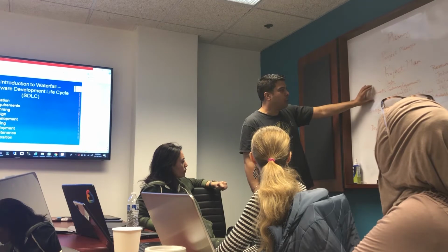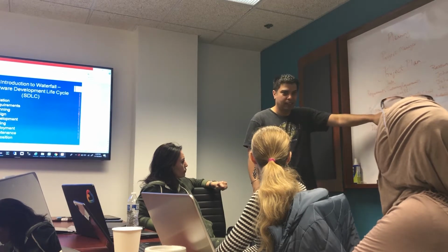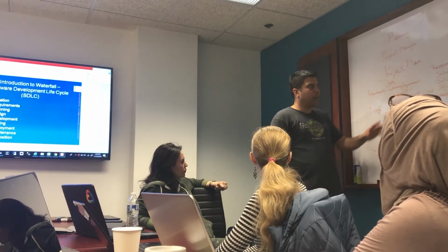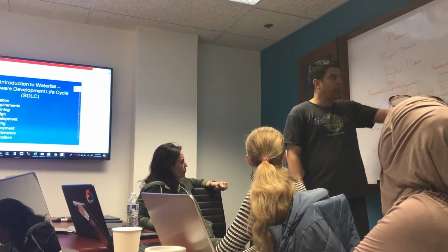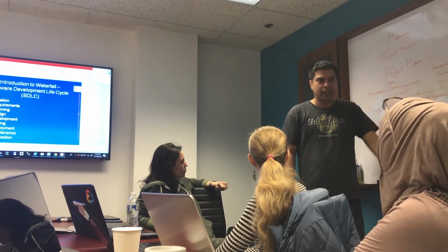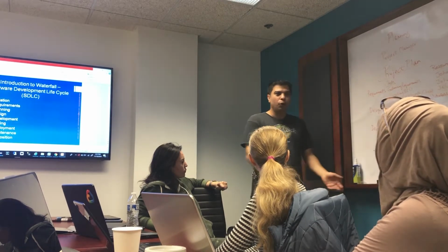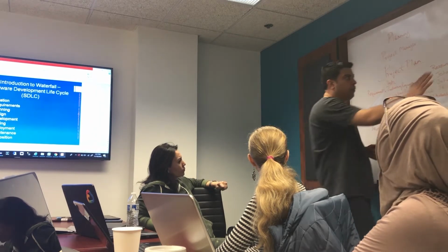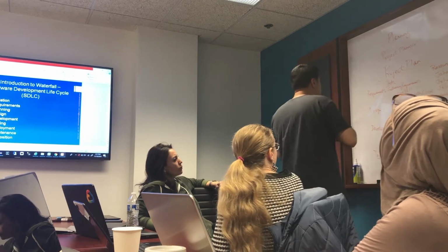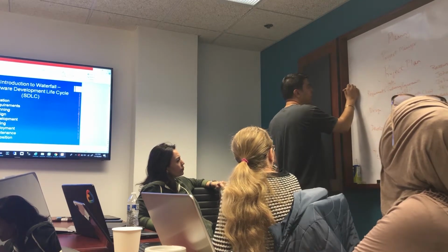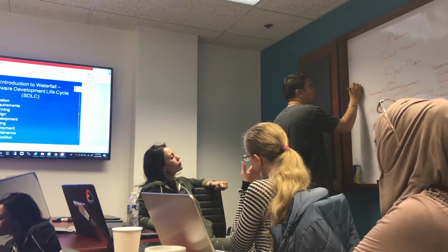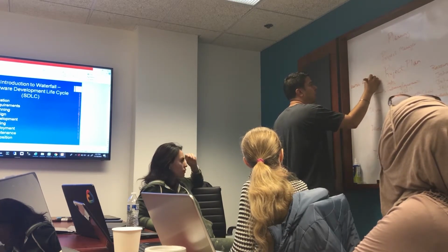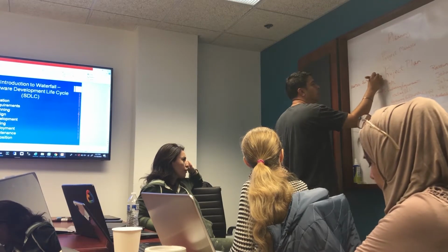You have each team, their tasks, and you'll know what the design and development and testing tasks are when we get there. And resource names, who is doing it, timeline, start date, end date. And if you want to be more thorough, you can add something like percentage completed of the task. I don't have space, but I'll write it down here. So this is at the end after timeline, start date, end date, and percentage completed.